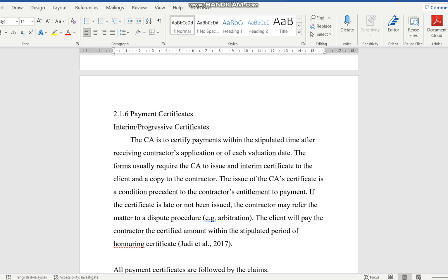So these are more for maybe architectural items, like say doorknobs, window frame, one sort of cathodic protection, paint, all this needs to have a final brand and also model and all that confirmed. These are all considered as prime cost sum. So there's a bit of a difference. So I'll put that in the notes later. So these are all dealing with money. So then of course the last is contingency sum.